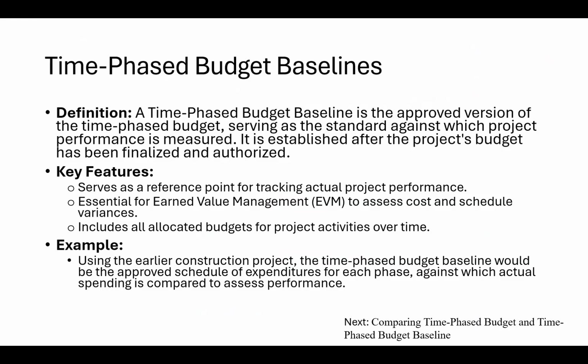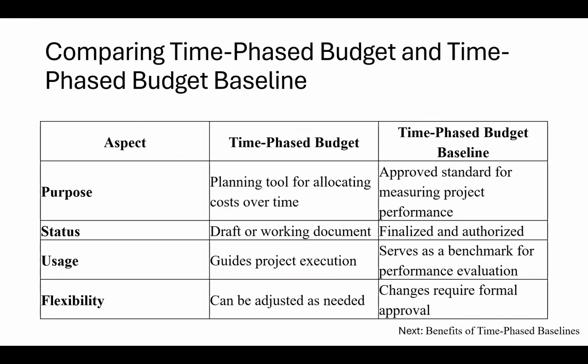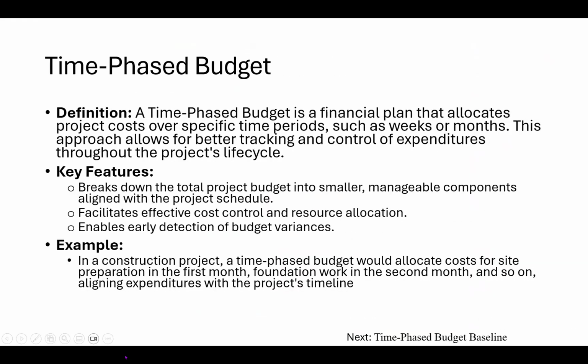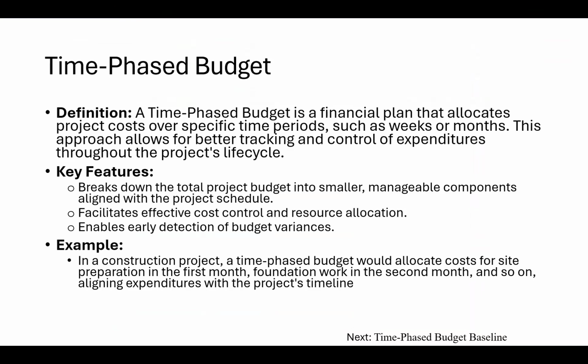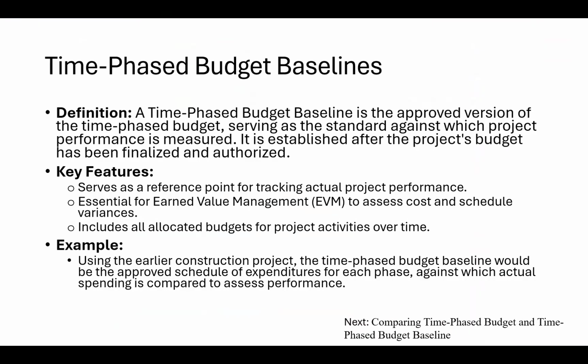Baselines. Okay, so what's the difference between time-phased budget and time-phased budget baselines? Time-phased budget is something you came up with and have a plan, put it together, but it wasn't approved. It did not become the standard. But when we move into baselines, now we have a standard.